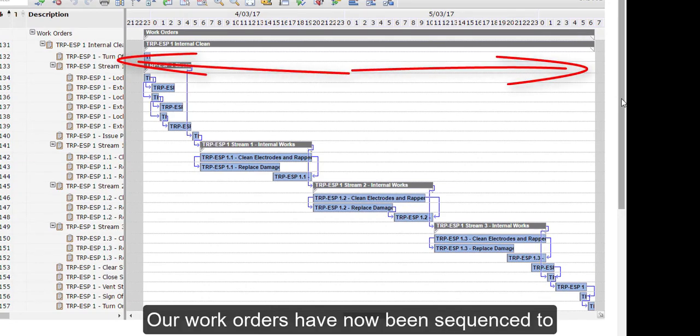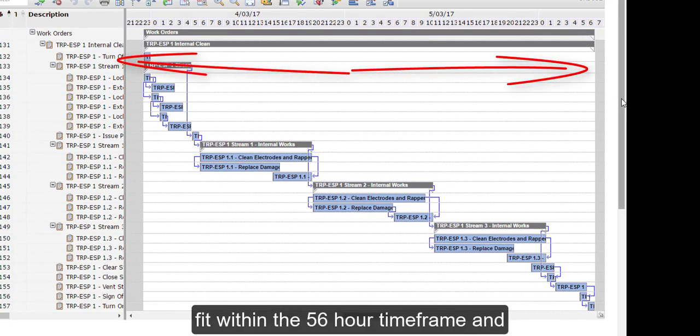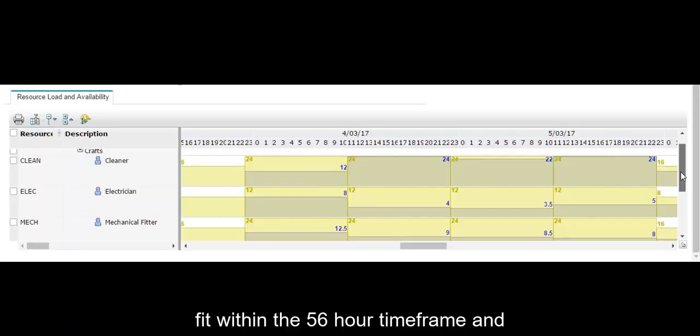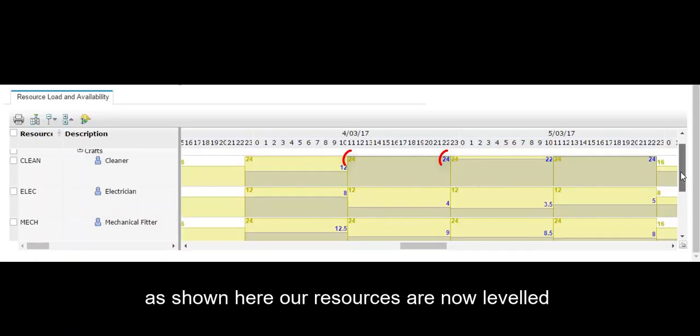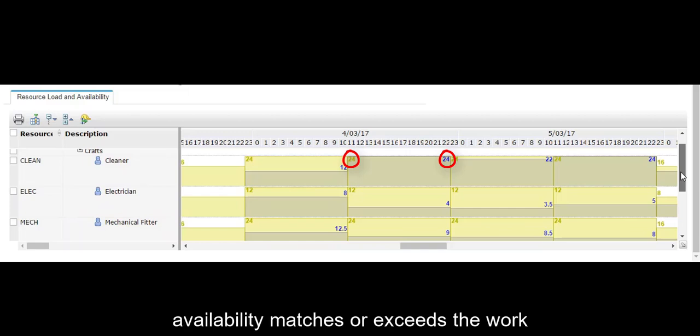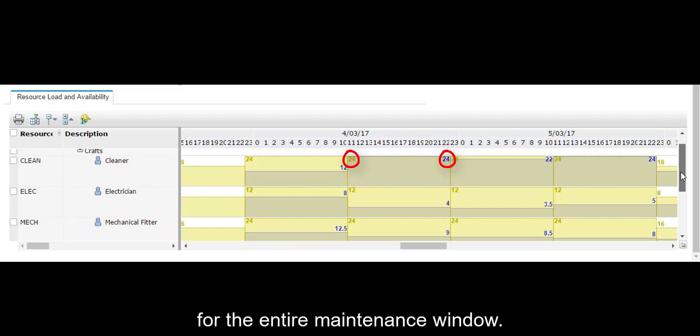Our work orders have now been sequenced to fit within the 56-hour timeframe. As shown here, our resources are now levelled across the 56-hour window so that the availability matches or exceeds the work for the entire maintenance window.